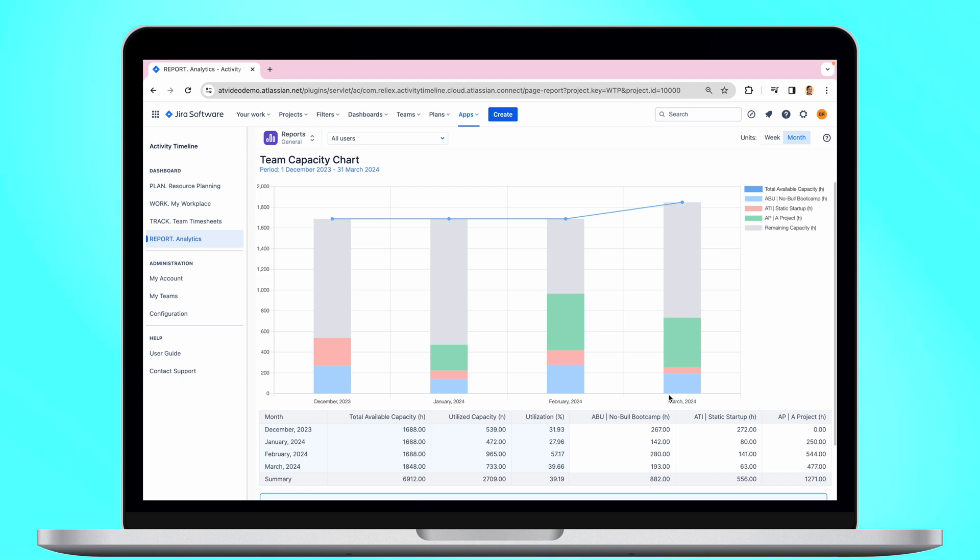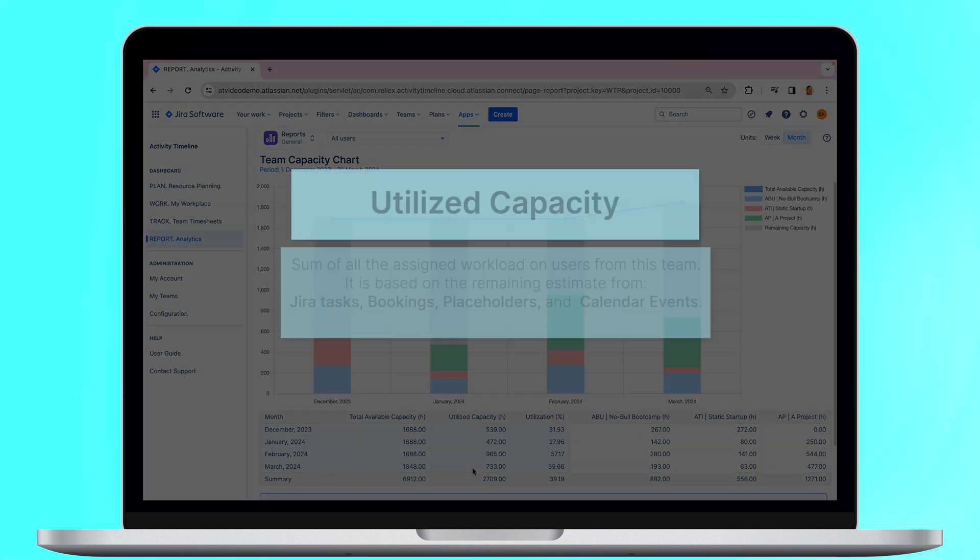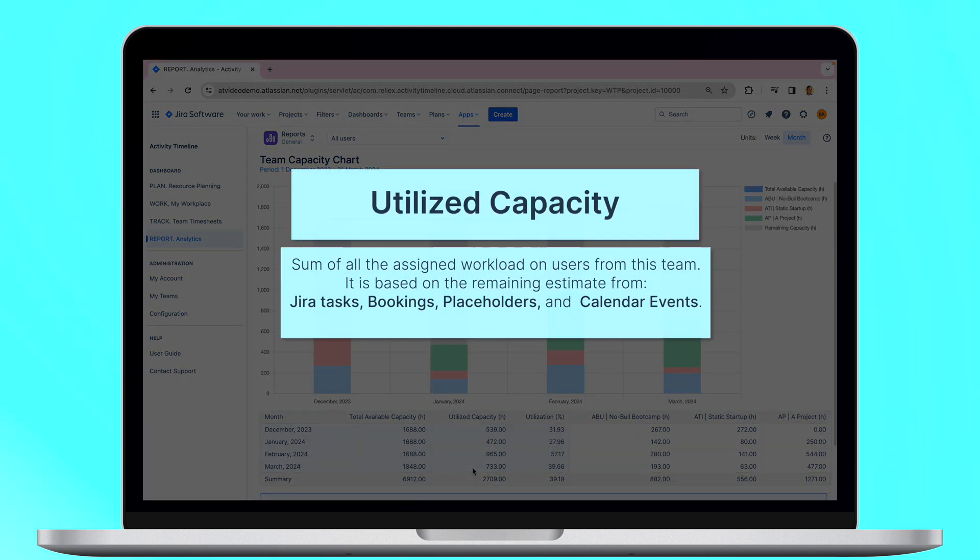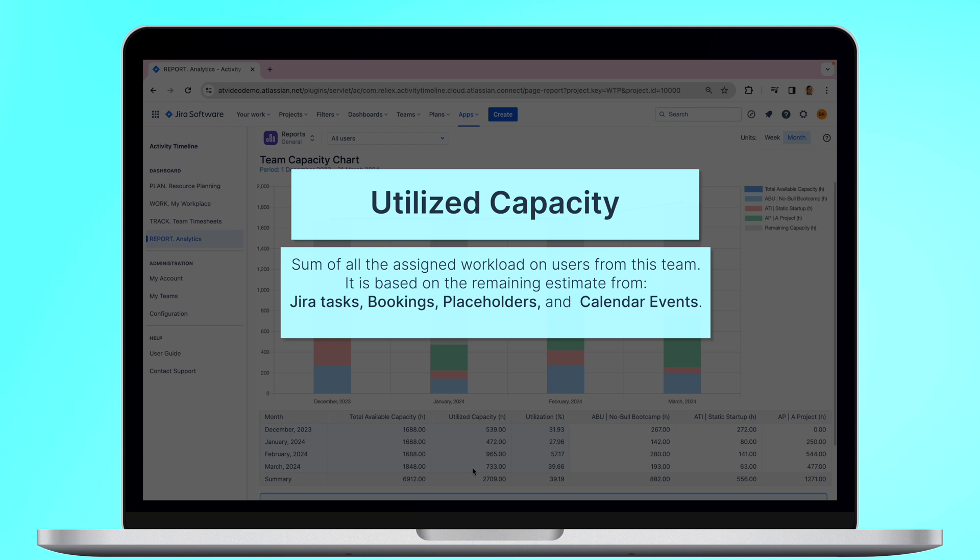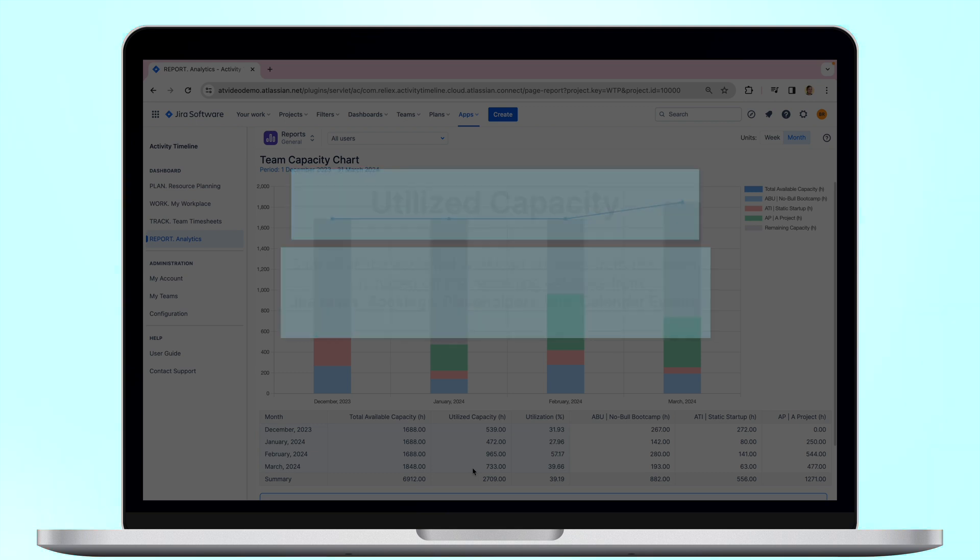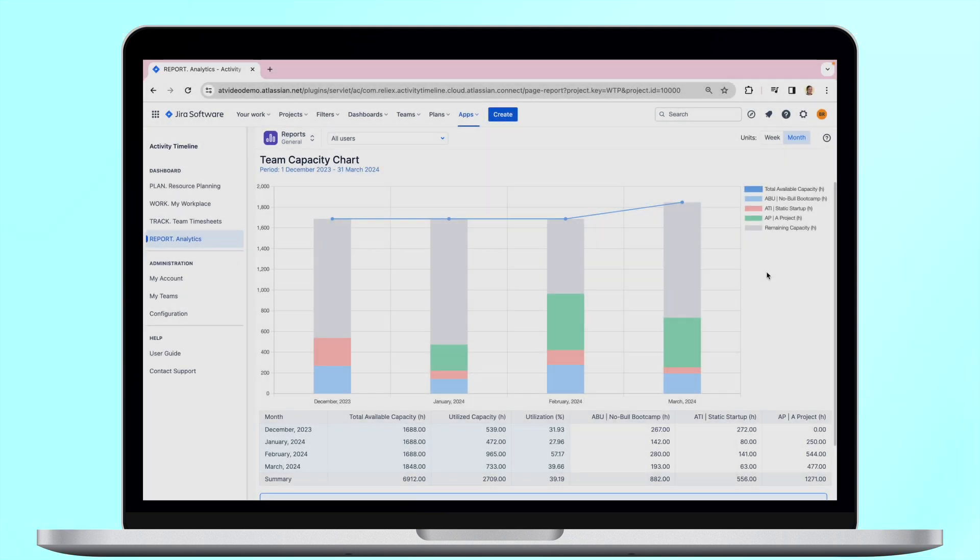Next goes Utilized Capacity. This is a sum of all the assigned workload on users from this team, which is based on the remaining estimate from Jira tasks, bookings, placeholders and imported calendar events.